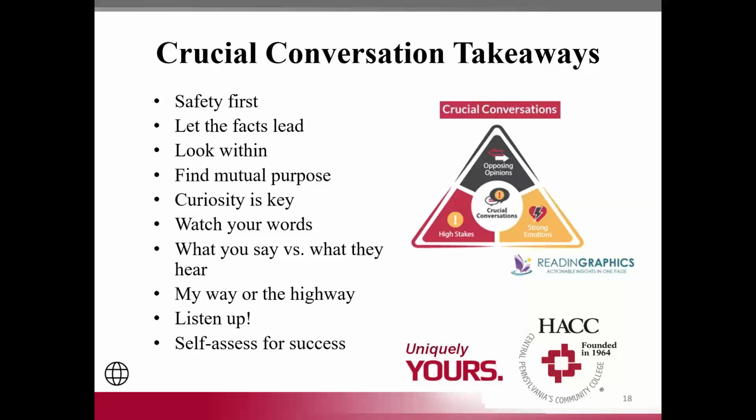Finding a mutual purpose. If a meeting gets out of control and you're arguing about something, the mutual purpose is: the bottom line is we have to install that pump before Friday, otherwise the system isn't going to work. So we can sit here and argue about it all day long. I'll go back to a construction trailer, to an interaction with a subcontractor and the QA who didn't like what they put in. You've got to get folks to calm down and take a look. Here's what's in the specs. Here's what's in the drawings. This was in the contract documents. This is what we've got to do. We all agree to it. We know there are issues causing us friction, but how do we do that?